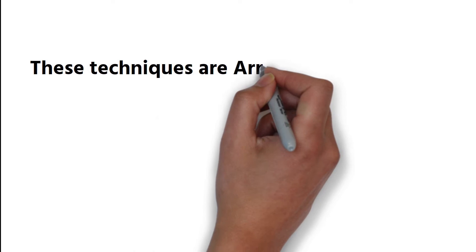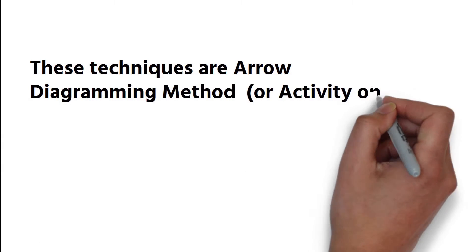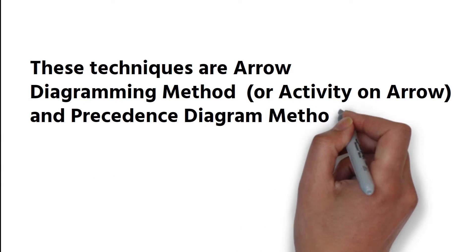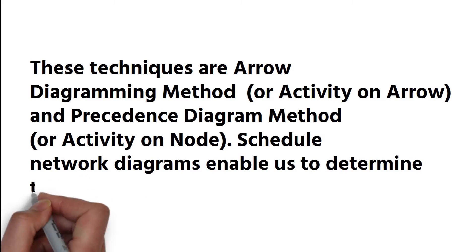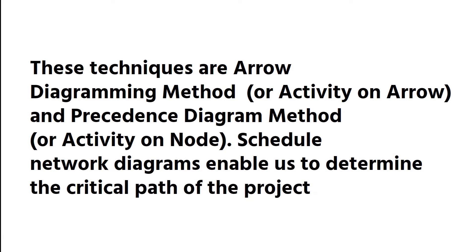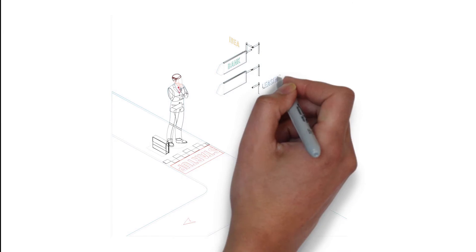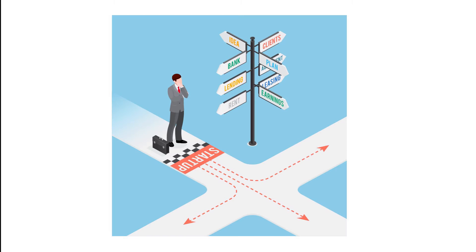These techniques are Arrow Diagramming Method, or Activity on Arrow, and Precedence Diagram Method, or Activity on Node. Schedule Network Diagrams enable us to determine the critical path of the project. The critical path is the longest path where a delay on it results in a project delay.